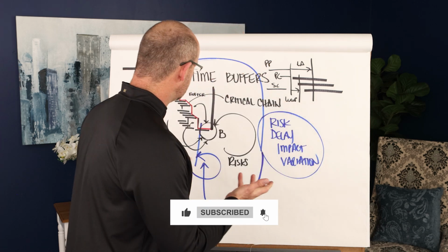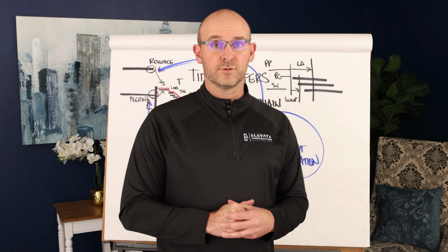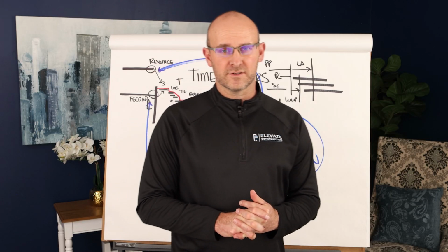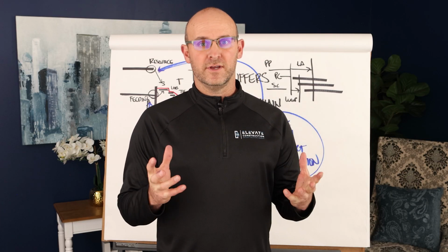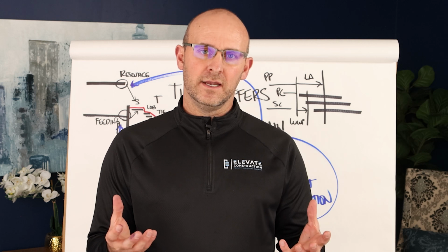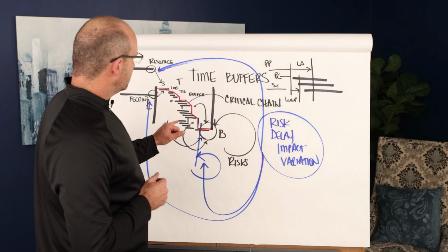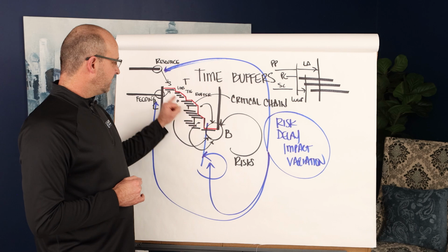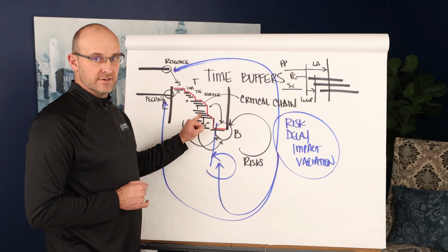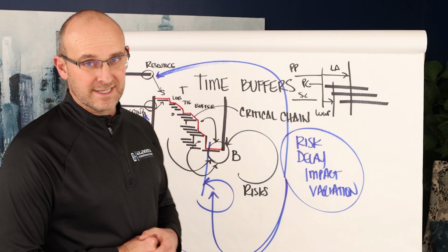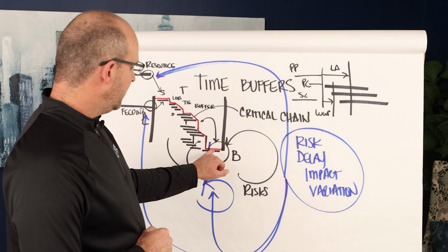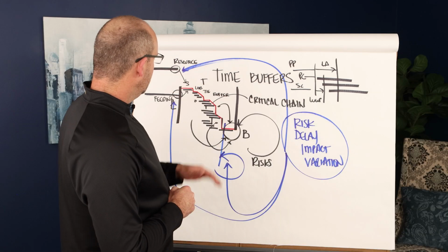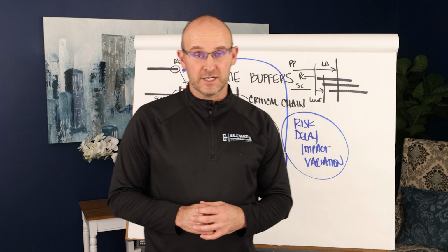This is all attributed to the Goldratt family and Goldratt's Rules of Flow. Absolutely love their work. It's all centered on one piece flow, one process flow. But let me tell you the philosophy here. The philosophy here is that we don't want unnecessary sandbagging or additional safety factors put into the activities themselves. If we have a buffer, we want it at the end. If we have a buffer here or anywhere throughout, we must also have the buffer in the other timelines and in the supply chain as well.